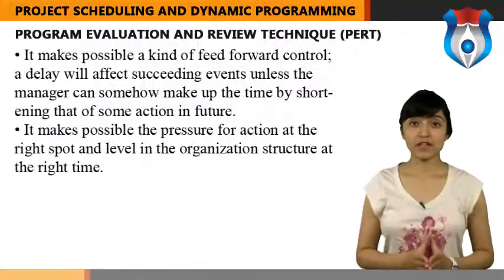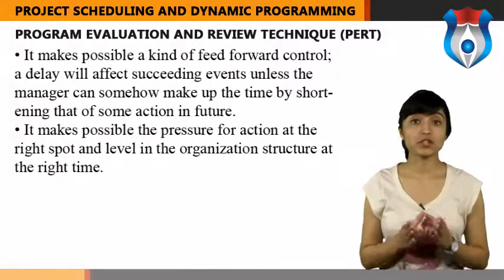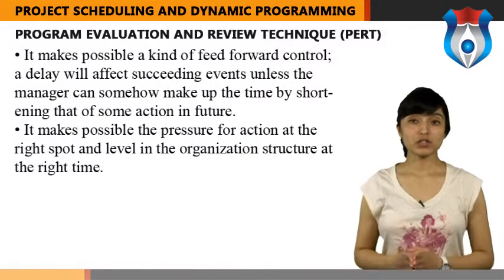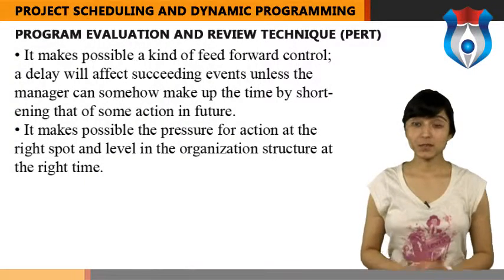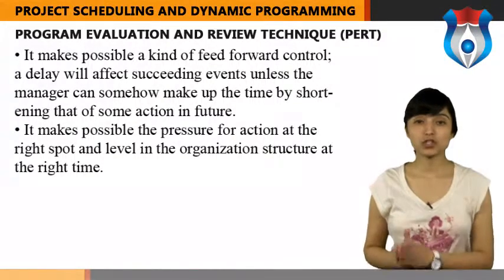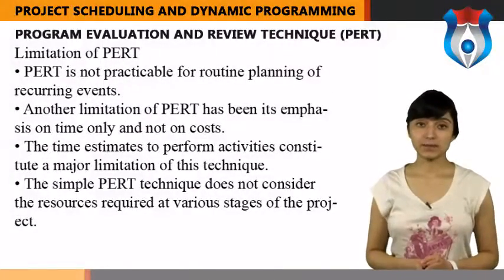A delay will affect succeeding events unless the manager can somehow make up the time by shortening that of some action in future. It makes possible the pressure for action at the right spot and level in the organization structure at the right time. Limitation of PERT.